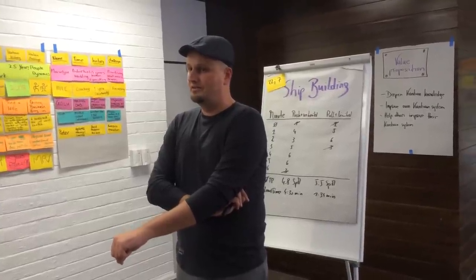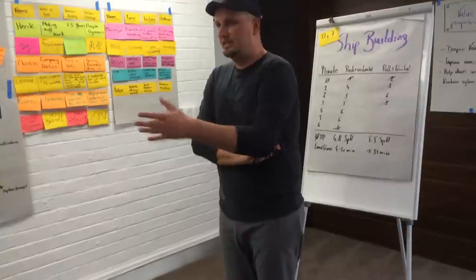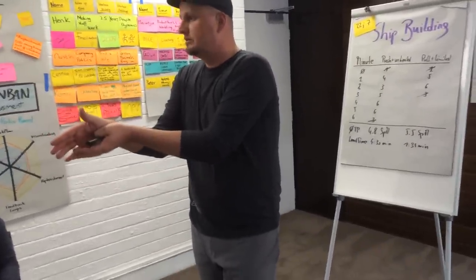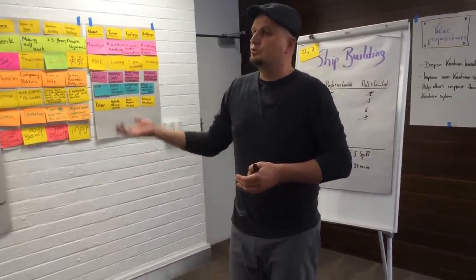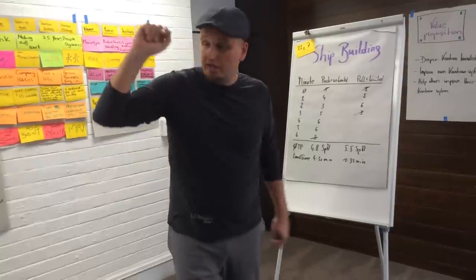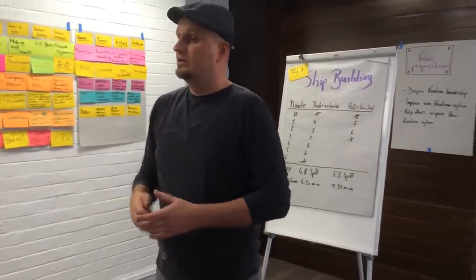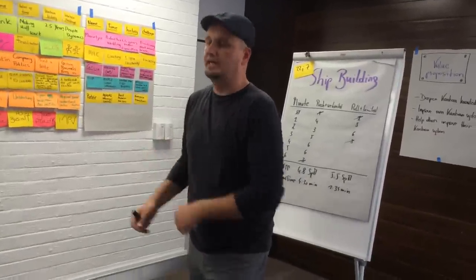So I had like a whole big queue of things. So I ignore the queue and just focus on the red ship. Exactly. So what we actually do, the queuing mechanism, we change it from FIFO, first in, first out, to LIFO, last in, first out, right? So whenever a red ship enters an activity, we work on the red ship first. And the consequence is that the red ship, of course, overtakes all the white ships, right? So what's the consequence regarding lead time for the red chip? Much faster. What's the consequence regarding lead time for the white chips? Slower. Slower, right.